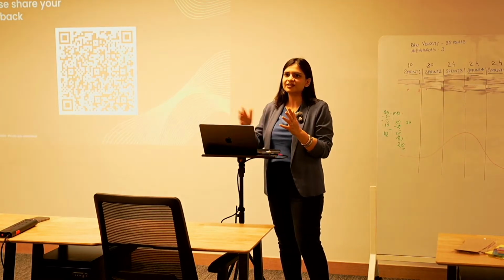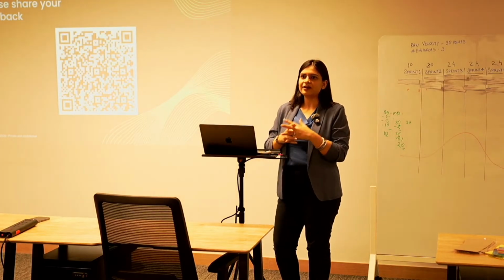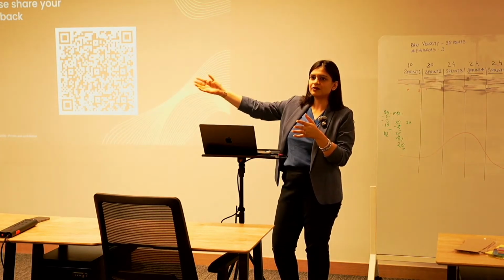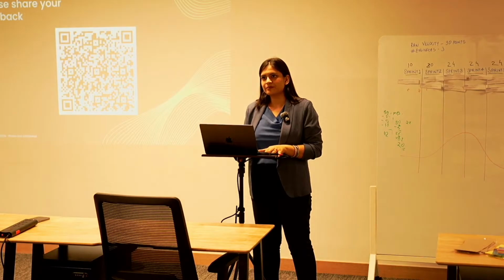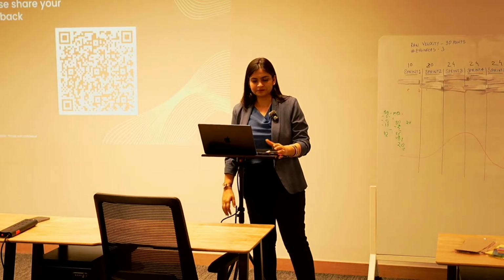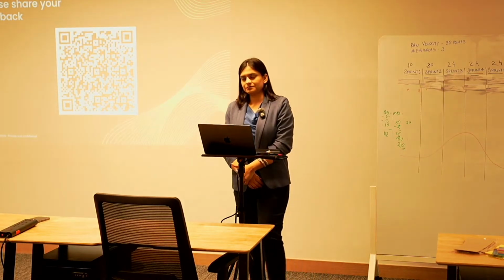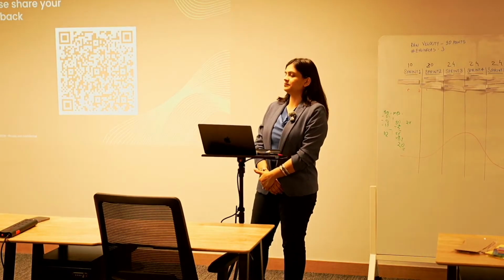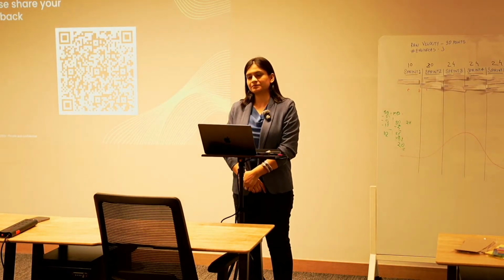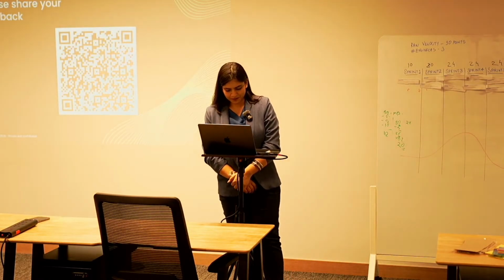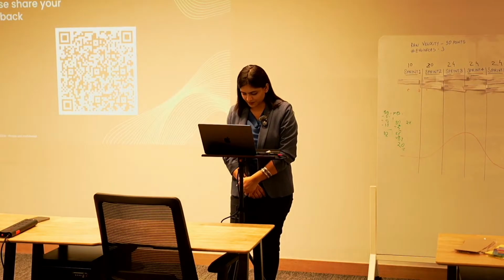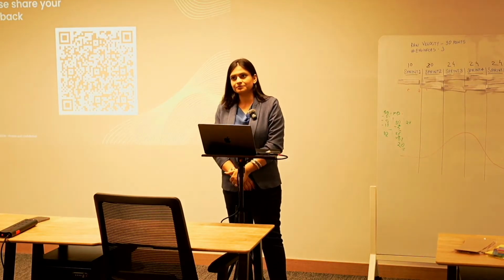Testing has to be embedded in all stages of your delivery, right from adding unit tests to code bases and then to automated tests right before release. And sometimes you also try to achieve it through processes, like bringing in test checks. So if a test check has passed, only then does the story move to a test stage or come into the QA bucket. Test check eliminates a lot of the testing effort required from QEs, and QEs can majorly focus on the exploratory part, so that you're making sure that all the acceptance criteria of that particular story are tested by the developer itself before the story even moves to the QA environment.